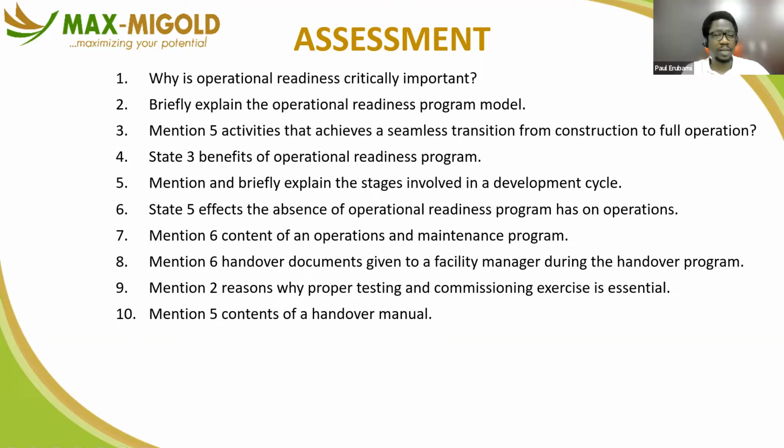It's the story of every project. The contractors will not stay during the defect liability period. They will leave. If you find anything during that 6 months, you call them to come and fix it. But that's if you have their money. If you don't have a percentage of their money in your hand, they will not answer you again. That's straightforward. Wow. They are gone.